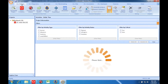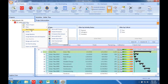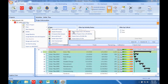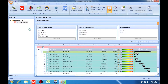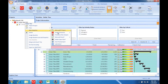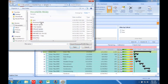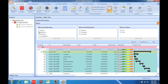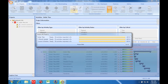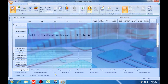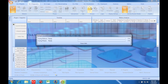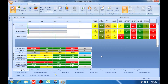Now let's do something a bit different. I'm going to load snapshots of the schedule I've been looking at. Let's say I've been looking at the baseline and I want to look at the quality of some of the schedule updates that were made while the schedule is being executed. I go back to the main screen and load the snapshot projects. When I return to the diagnostics view, I can see that I have ribbon views for the original project and also the snapshots.